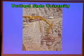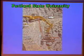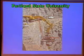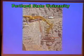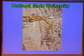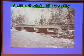So it's quite an involved thing, and to do this work we have an inventory of the entire retaining wall system in Glacier National Park, and we know where the worst areas are. The programming for the projects is really pretty much done by the wall management program, because that's the critical part of the project, or the critical part of the infrastructure for the road.